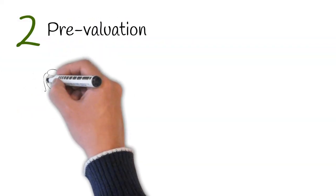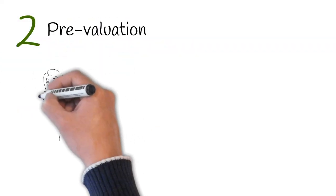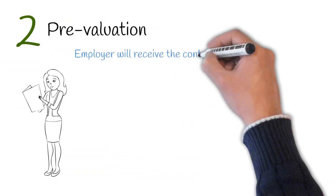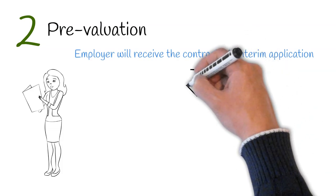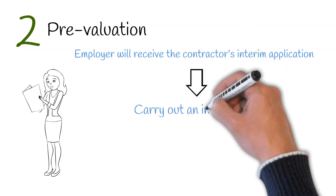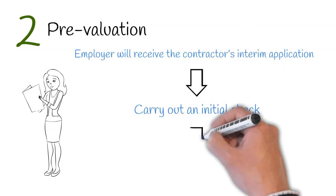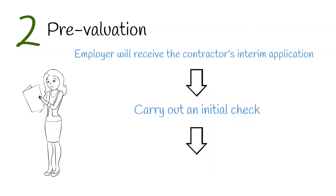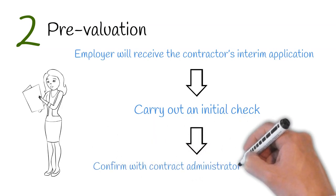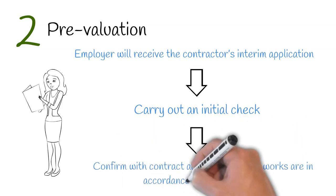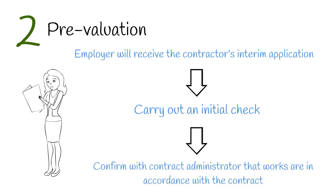Stage 2: Pre-Valuation. This is where the employer will receive the contractor's interim application and carry out an initial desk check on the application provided. The employer's quantity surveyor will need to obtain confirmation from the contract administrator that all works are in accordance with the contract.